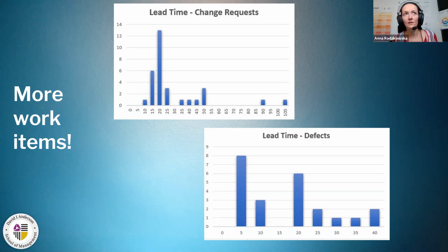But then if you see that, say, you deliver this defect within 14 days, you see that there is day number 9, 10th, and you still didn't start testing on it, then you can use the classes of service, and maybe you need to change the class of service for this item from fixed date, for example, to expedite.